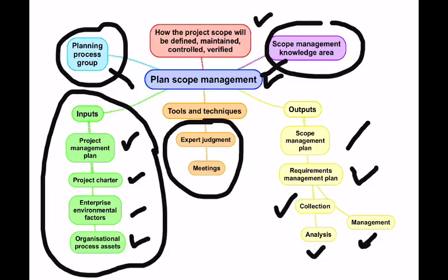It talks about how the requirements will be collected, by whom, from whom, in which format, how many interviews, what the schedules for those interviews are, and if it's a survey, how that will be performed, collection of data, collation of data, analysis of the data. All these things need to be defined. So all these things get into the requirements management plan.